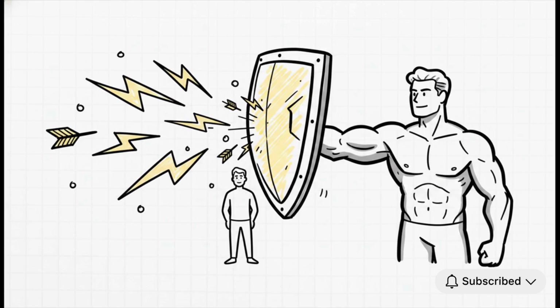Basically, the risk of liability completely shifts. With a normal claim, you have to prove the breach and prove the loss was foreseeable. But with a tightly drafted indemnity clause, you force the other party to simply protect you and pay for the liability that arises, often regardless of how remote the causation is. It is a total game changer.